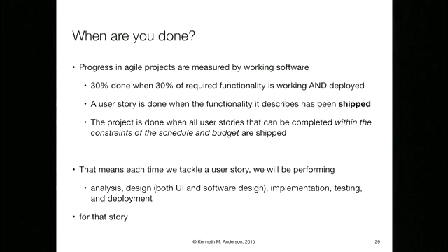It's being used by the users, not being tested by the developers. And then the project is done when all the user stories that can be completed within the constraints of schedule and budget are shipped. At some point, the money ends, the schedule is done, and you have to call it quits. And so what that means is that every time we tackle, so this is another thing that people don't like about Agile and user stories when they first get into it,